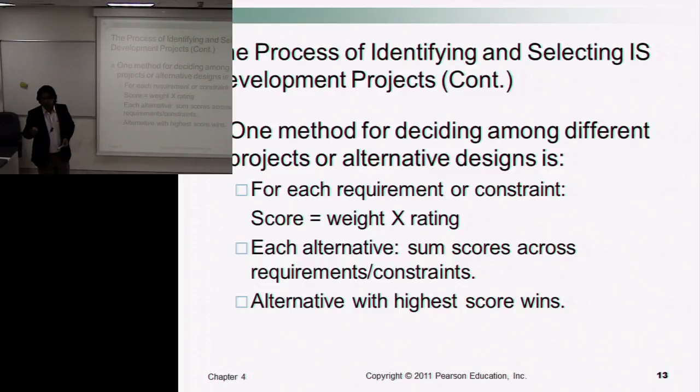So to solve that problem, I cannot say that I would go for all of them. I will adopt all the solutions and then will remain confused which solution should be used. So I need to select one of them. That selection will be based on the score formula, which is based on certain ranking, rating and weightage. At the end of the day, whatever solution has the highest score would have the highest probability of selection among the multiple alternative solutions. And finally, we add them, and the highest score is going to win.